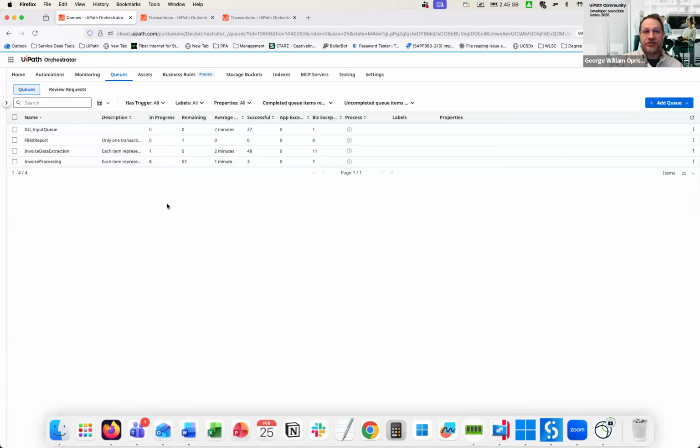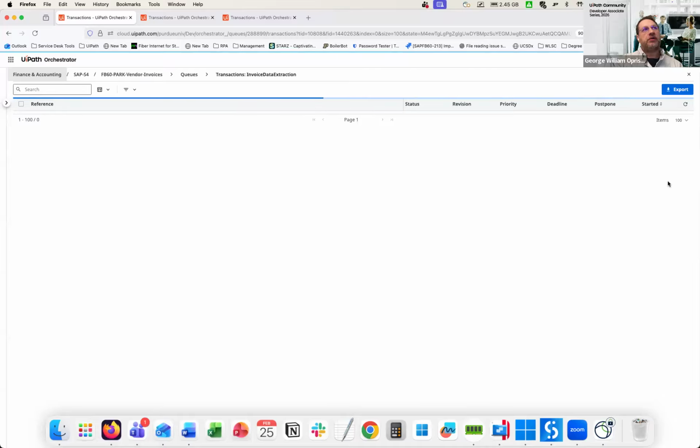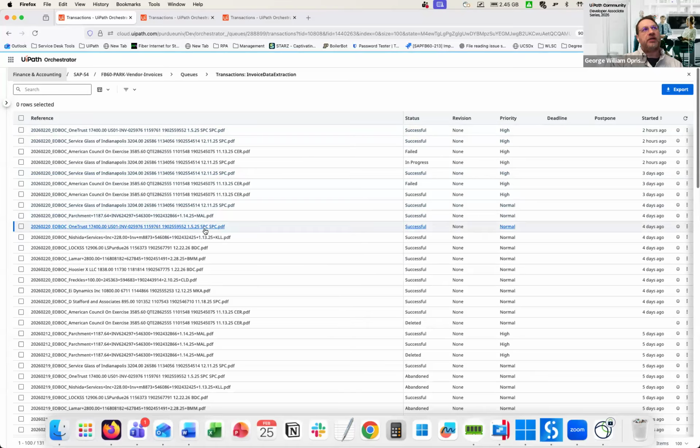And really what we're looking for is intuitive. So is the structure intuitive? Are the naming conventions intuitive? Does it help guide us with regard to questions and also with regard to troubleshooting? And that really blends into the testing. So as we're testing it, we do functional user tests. So we mock up what we expect the user acceptance test to be and run that as many times as possible. And you can see that here, where we've generated these queue items and we've got our own scenarios where we anticipate which ones should be successes, which ones should fail, and the reasons for the failures.